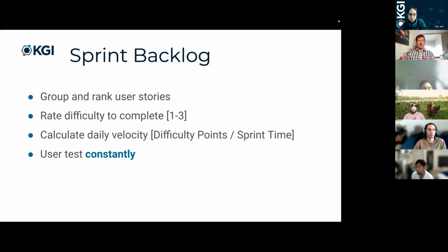So it's how many points of work need to be completed in what amount of time. It's almost like a miles per hour type of thing, right? It's like, I need to do these 10 points of difficulty tasks in 2 weeks, and that's my velocity. It doesn't really mean anything the first time you do it, right? Because it's a relative thing.